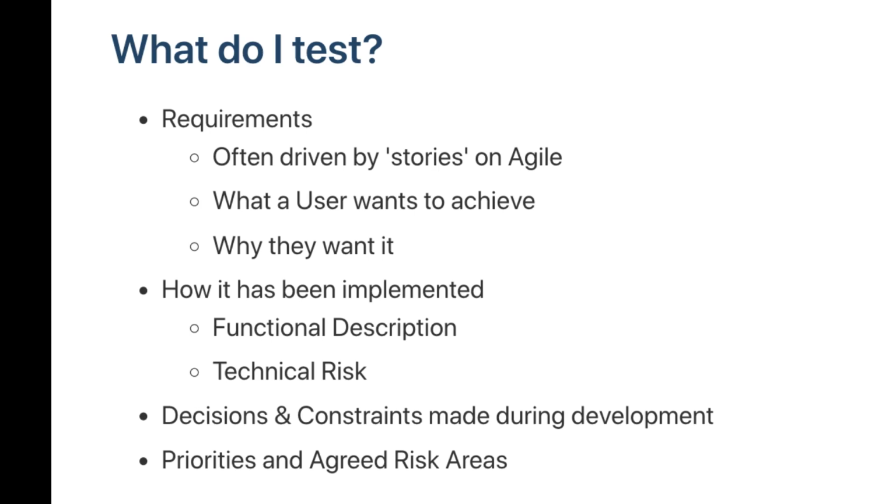If we take on board all the decision making about testing and we skip an area, it's perfectly valid for people to come and say, why did you not test this? If you share that knowledge, prioritization, agreed risk areas and thought processes, more people are involved and you get less of that blame game. If you do take responsibility for it, then you have to cover yourself by writing down the decisions that were made, the reasons you made those choices, what impacted it, why you decided not to do something because person X said this in meeting Y. Make those things written down so that you know why you made particular decisions.